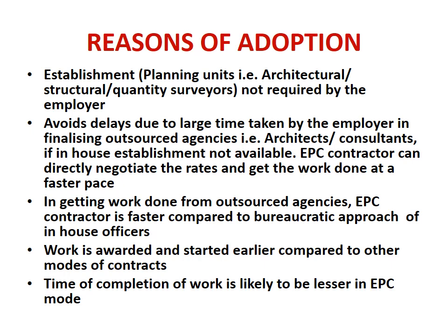But in this case, bill of quantities or detailed estimates are not to be prepared. So work can be awarded earlier, and the client becomes happy that the work has been awarded and started earlier compared to other modes of contract.